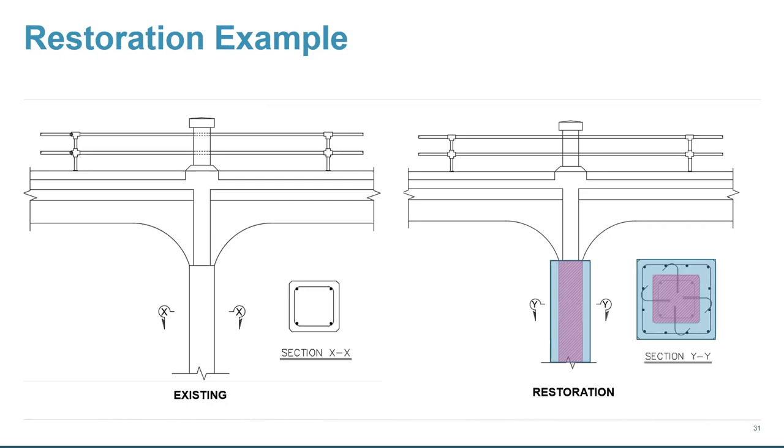Mitigation can come in multiple forms. Mitigation would be a historic restoration, which would involve one of the options being evaluated. Mitigation would be an in-kind replacement. Mitigation could also be what's called a reclamation process, where all of the existing structure and historic features are recorded and archived if hypothetically something different was going to be built. But as everybody heard, we're evaluating those and contributing to the evaluation process to determine what's the best option for the city to explore and to deploy. We're simply a contributor to that effort looking through the CEQA lens. Does that answer your question?